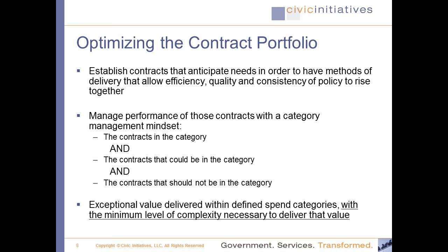A lot of times we have a great deal of contract administration burden in some spaces because there's just one I'm going to talk about as an example. Job order contracting. Some people don't. If you are running the way that you deal with job orders on small construction type of thing, you might have 1,000 vendors signed up on that. Or you could create a job order contracting method and you have one, right, who's then managing some of those.